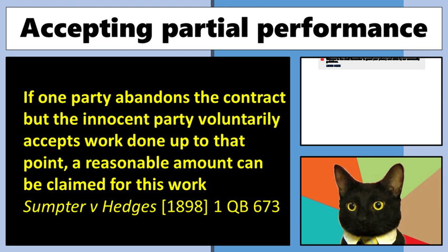All right. Here, though, the courts did say in equity, if and only if one party is doing the work and then for whatever reason abandoned the contract, or there's some legal defect that it's not a contract, and the other side accepts their partial performance, so they knowingly and willingly accept the work that's been done up to that point, the side that's done the work can actually go to the courts and ask to be paid a reasonable amount, not the contract amount, if the contract amount would be more.